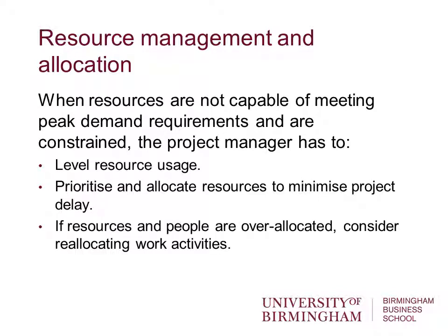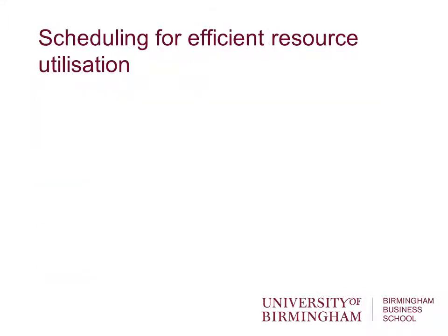If resources and people are over allocated, what else can we do? Maybe bring another person to take Ryan's role. Maybe outsource that piece of work to somebody else. Or consider crashing the activities. So we've added a whole load of time because we've had to level the resources. Maybe we can then go and crash the subsequent project. So let's think about crashing a bit.